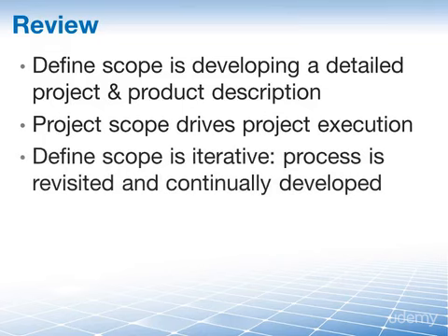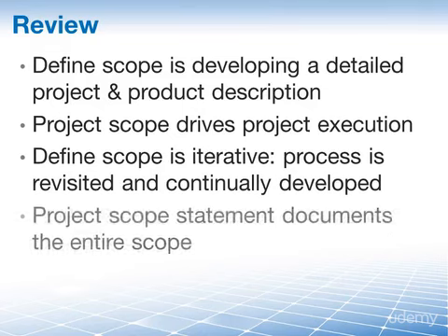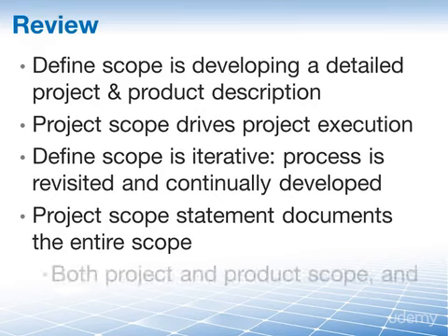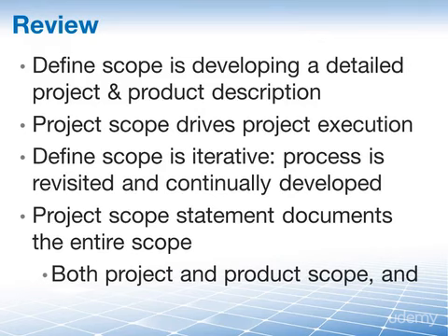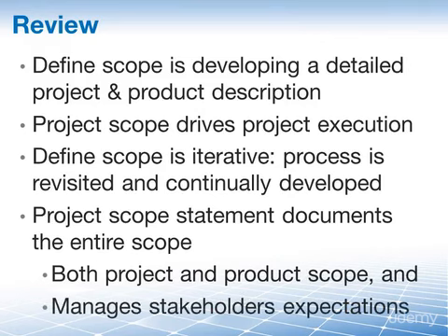The iterative nature of the defined scope process means that this process will be revisited many times throughout the project lifecycle to continue to develop a detailed scope. The project scope statement documents the entire scope, both the project and the product scope, and it is essential in managing stakeholder expectations because it includes items that are excluded from the scope.